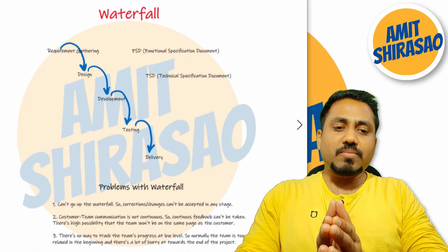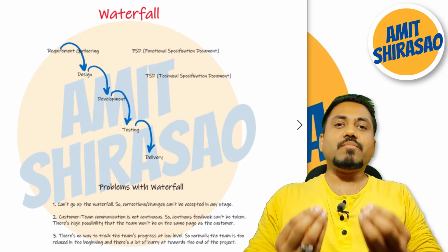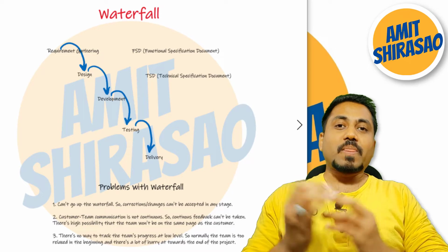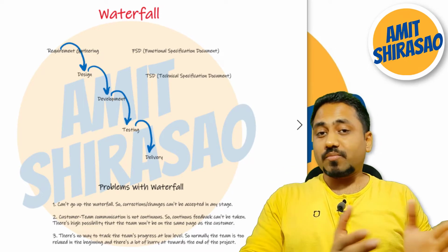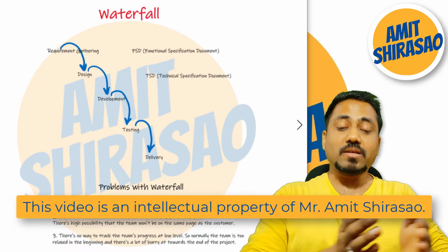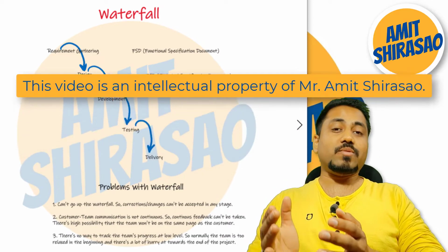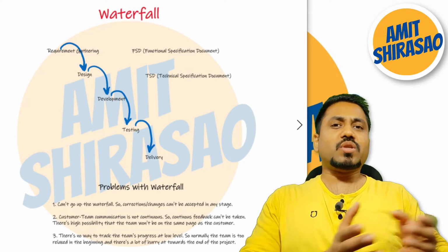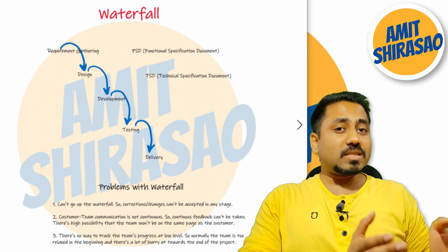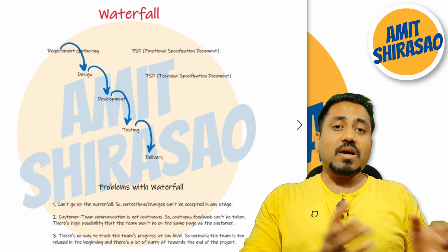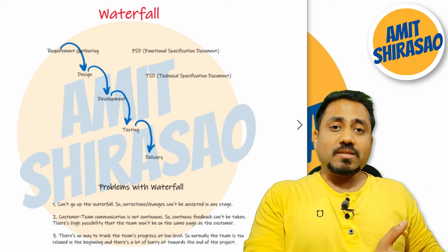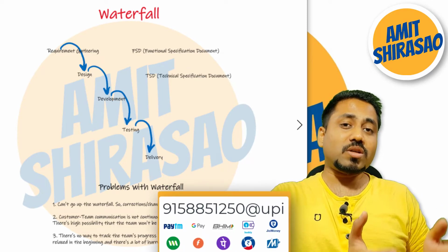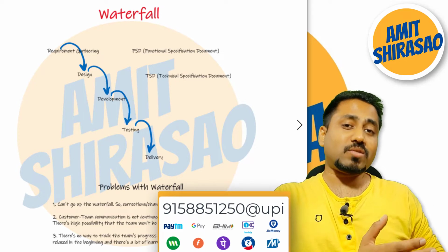In this waterfall, basically we are just trying to efficiently manage the resources, and the way to do it is people say that everything in a project happens stage by stage. Means first of all there will be a requirement gathering phase. At that time it is not required for the developers to be onboarded. We can save the budget on the developers. Again, at that time testers are not required, so we can save the budget on QA resources, that is quality assurance resources, also called as testing resources.